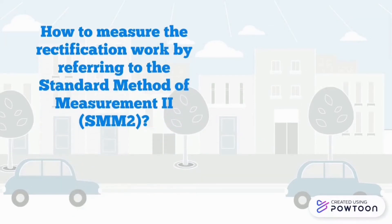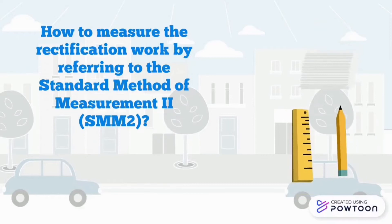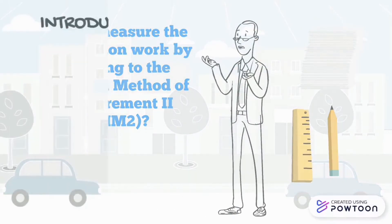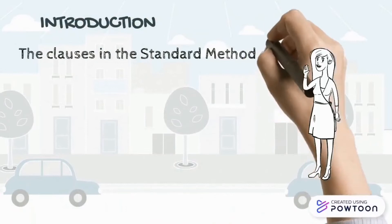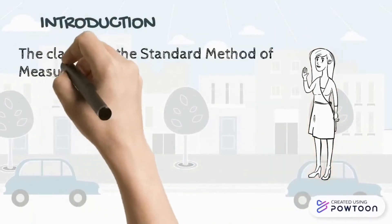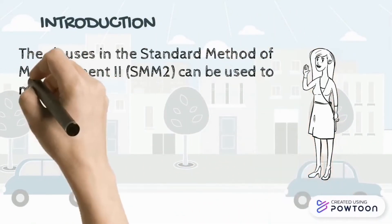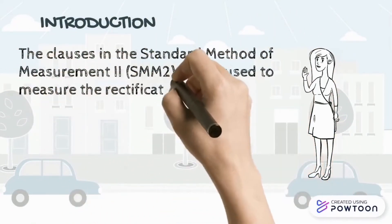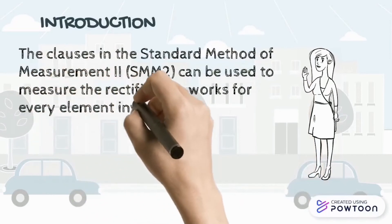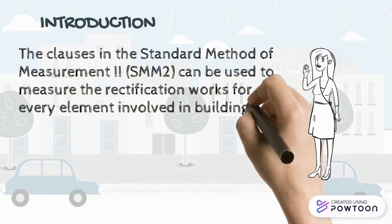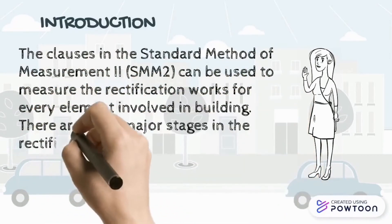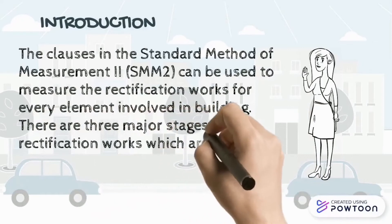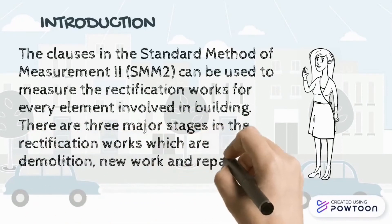How to measure the rectification work by referring to the Standard Method of Measurement 2 (SMM2). The clauses in SMM2 can be used to measure the rectification works for every element involved in a building. There are three major stages in the rectification works: demolition, new work, and repair work.